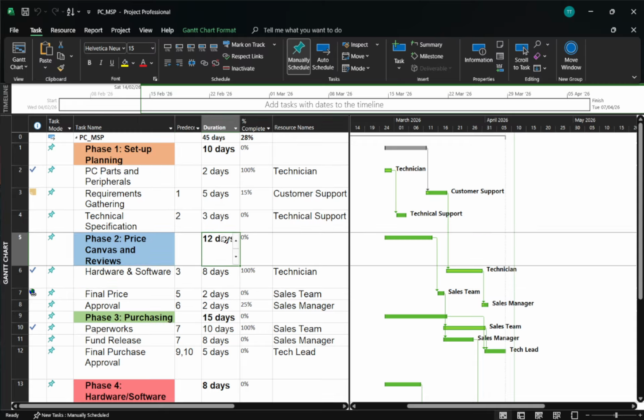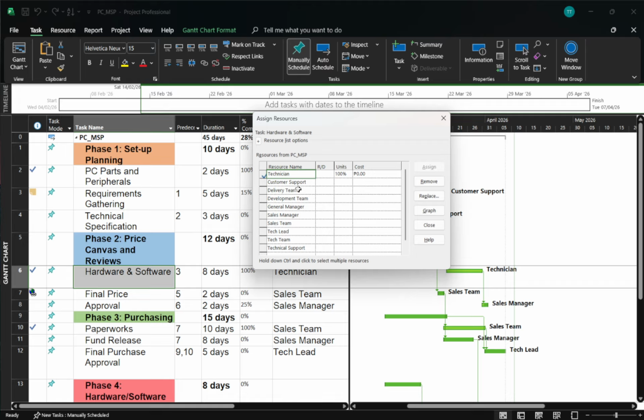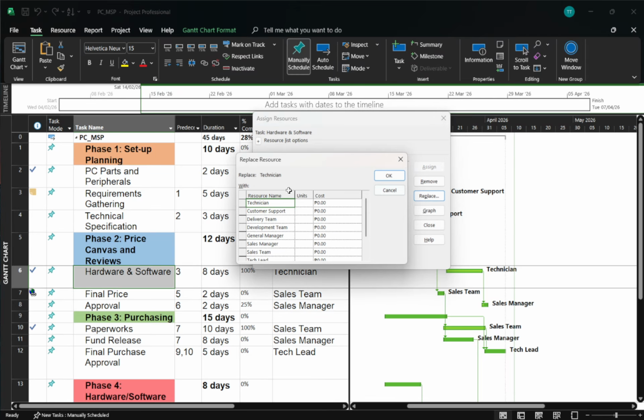On a fixed work task, the total effort stays locked, so duration can lengthen or shorten depending on the new resource's units. For example, replacing someone assigned at 100% with someone at 50% often extends the remaining duration because the same work is spread over less capacity. You may also see dates move if the new resource has a different working calendar. That's normal and reflects actual availability.